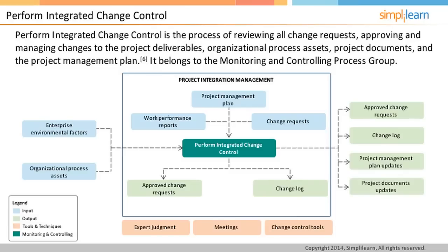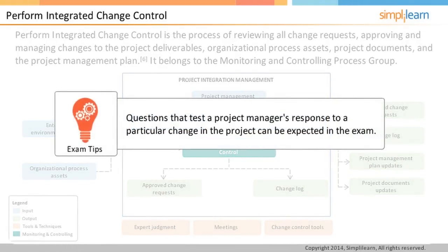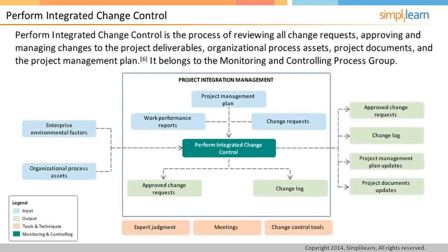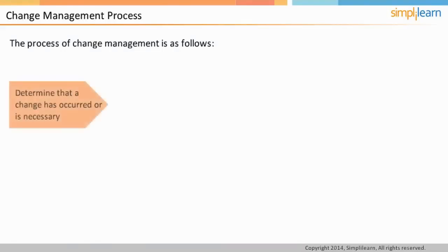You can expect questions in the exam which test a project manager's response to a particular change in the project. Now let us look at the process of change. First, the project manager should determine that a change has either already occurred or if the change is necessary. One of the important qualities of a good project manager is that they will push back on unnecessary changes.